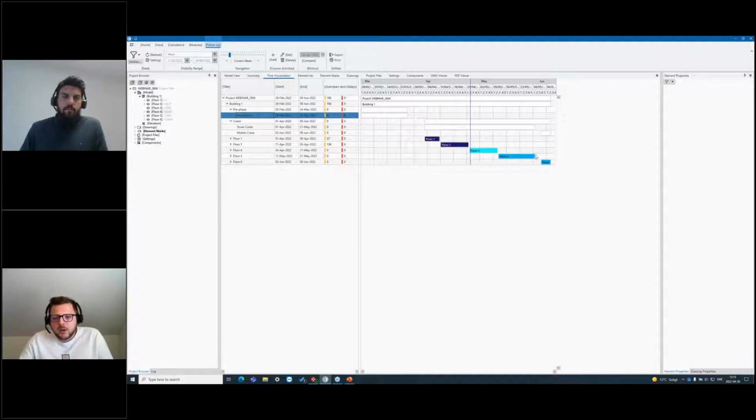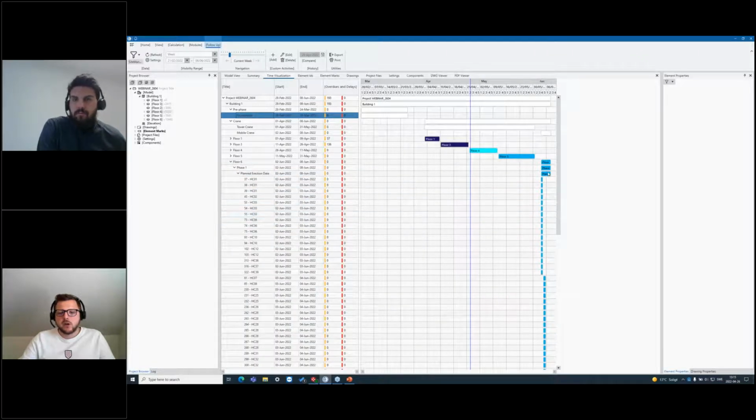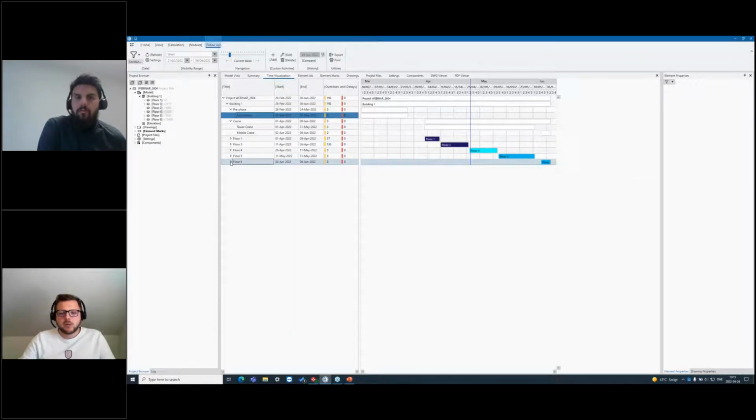But between the 5th and the 6th floor, we have a couple of days, or even half a week, without any cranes. We can also see that we don't have that many elements to erect on the 6th floor. So here the project management decided to remove the tower crane, and on the first erection day of the 6th floor, we will get a mobile crane.